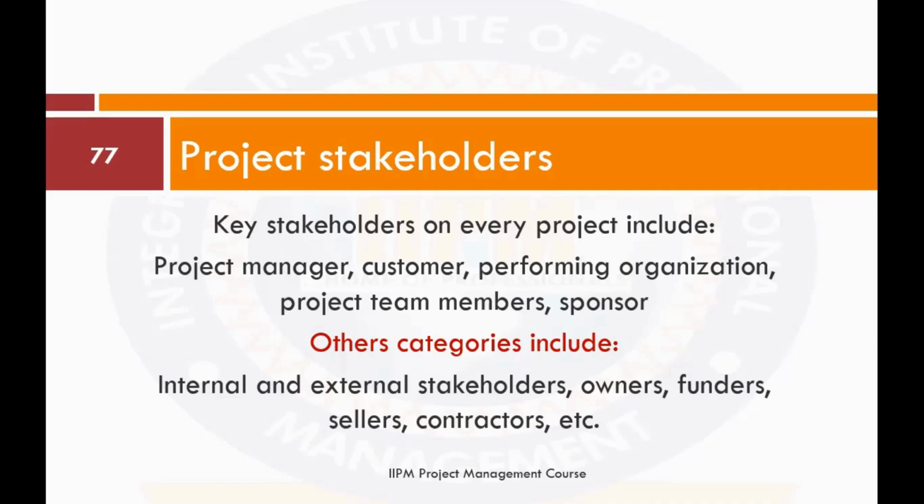Number two is that you want to find out the impact of each of the stakeholders. If you wish, you may want to categorize the stakeholders, then you begin to place impact on each of them. By categorization, you could have major stakeholders and minor stakeholders, and then others. Or you can say high impact stakeholders, moderate impact stakeholders, and low impact stakeholders.